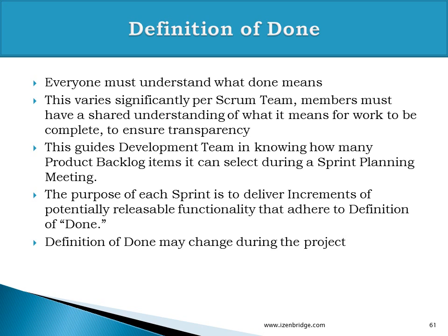Like, does it mean that the story has been tested? Does it mean the regression testing has been performed? Does it mean that it is checked in at a production server or at an integration server? So all the steps which are required in order to mark the story done are written in the definition of done. Now the definition of done may vary from one Scrum team to another, but it is always recommended to include acceptance from the product owner as a part of the definition of done.